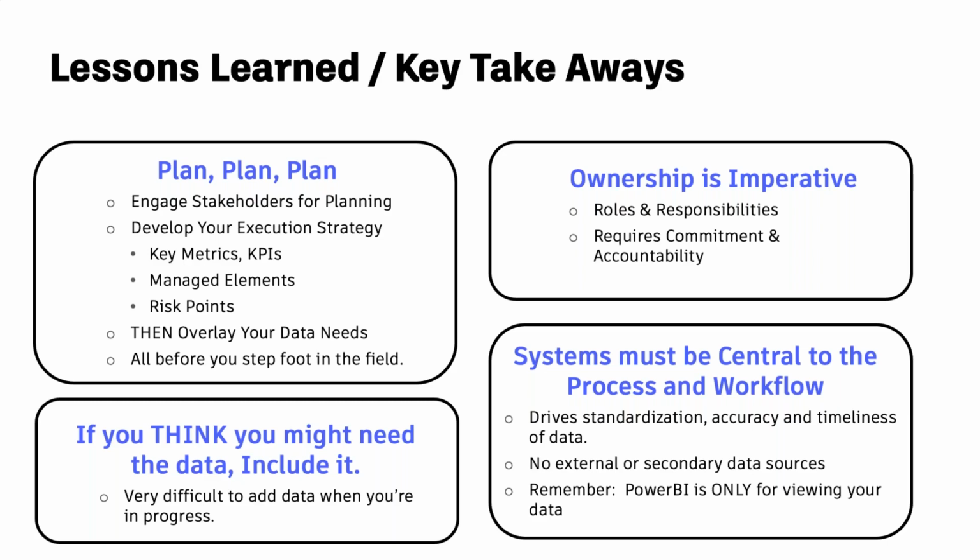Once you understand the process, as we mentioned before with that tool, overlay your data needs and then track that back to make sure that you're using all the right systems and that you have access to all your data and can bring it into a dashboard or however you need to look at it. And do all that before you ever step foot in the field. And if you think you might need a piece of data, include it. Most of you know it's very difficult to go back and recreate data that you didn't collect the first time.